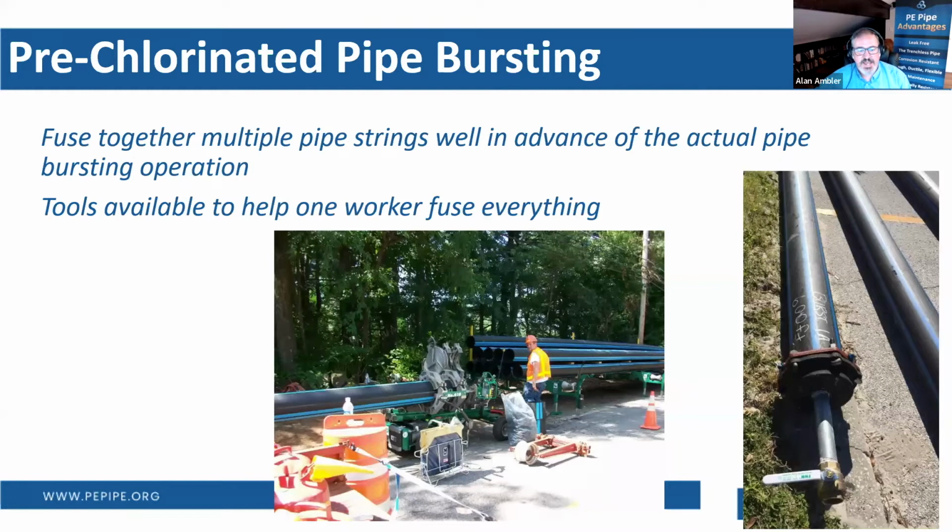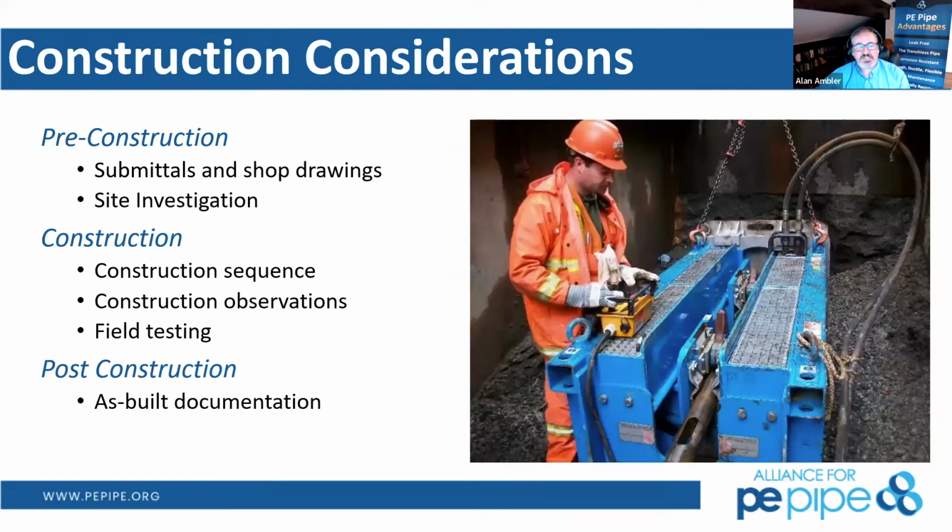So here you see a poly horse and one employee simply fusing long runs in advance. Now the other guys on the crew can go out and do exploratory work or the actual pipe bursting run as they go through it. And hopefully this gentleman doesn't get too bored fusing pipe all day, but hey, that's what they do. The tools are set up and designed with these types of things in mind.